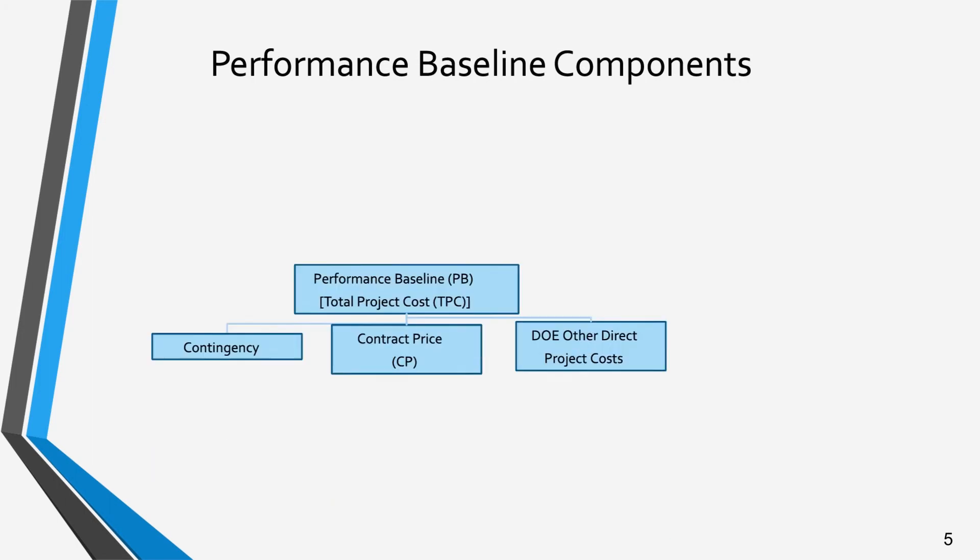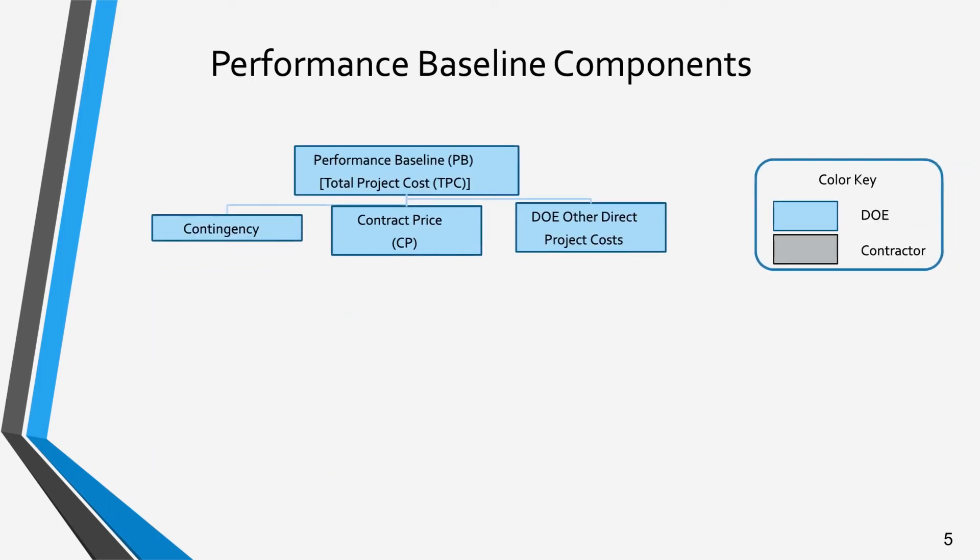The graphic on this slide provides a context in which to understand the components of the performance baseline, or PB. Those elements in light blue are controlled by the DOE and the elements in gray by the contractor. Starting at the top, the performance baseline represents the total project cost for DOE. This is broken down to three elements: DOE held contingency, the contract price issued to the contractor, and DOE held reserves for other direct project costs.